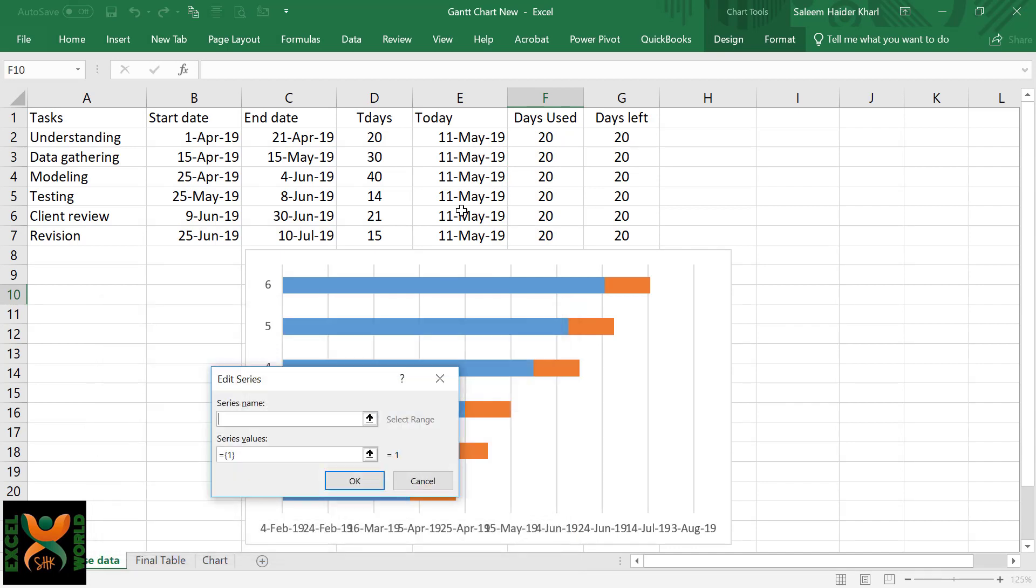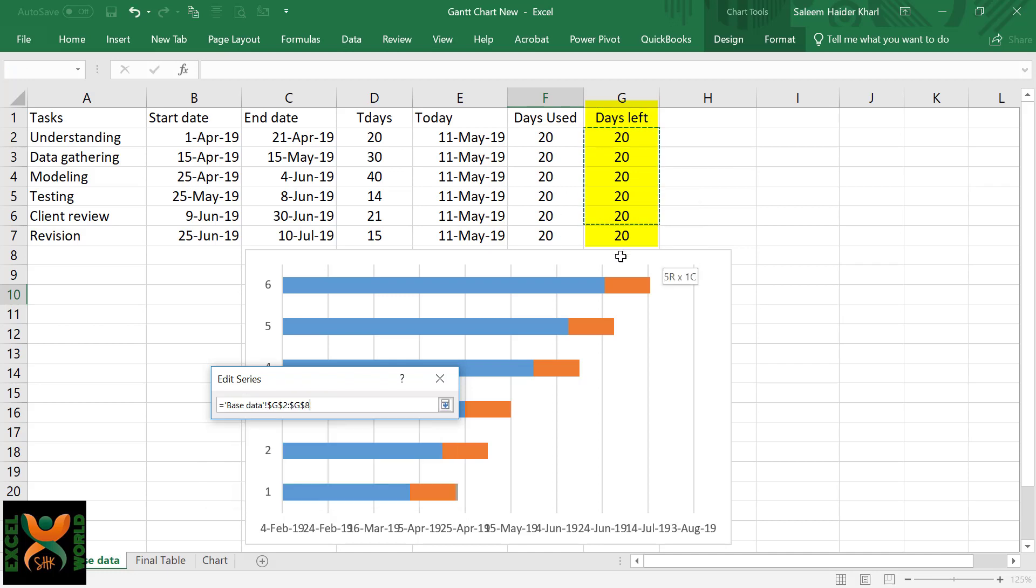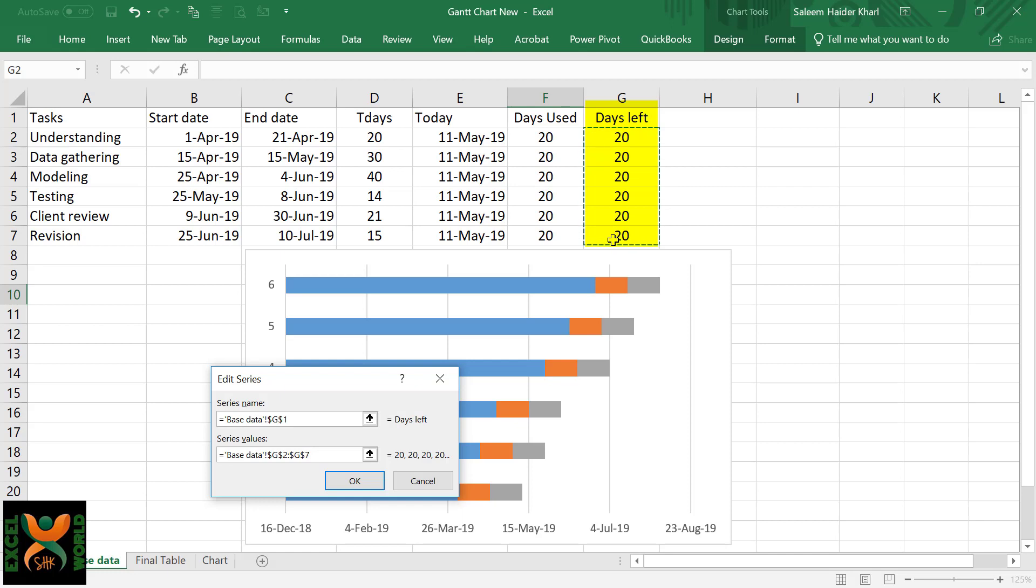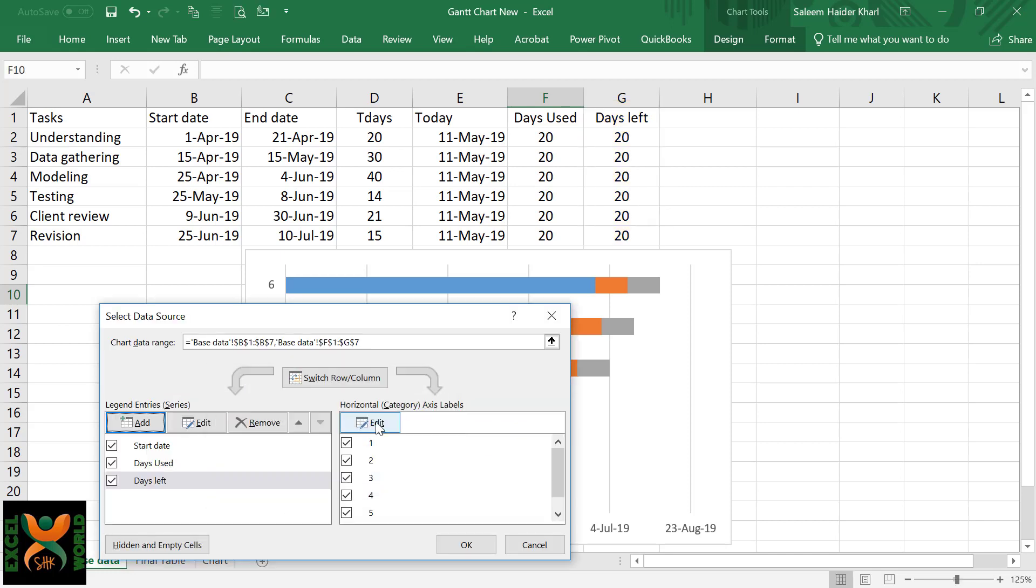Add another series. We will select Days Left, and in respect of series value, we are again going to select all the values below Days Left and press OK.